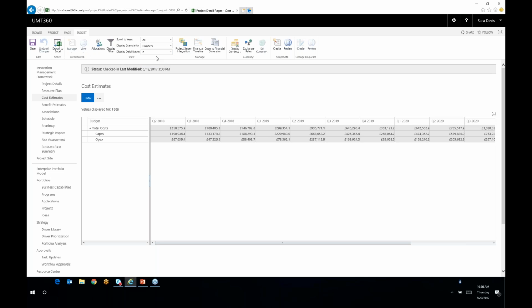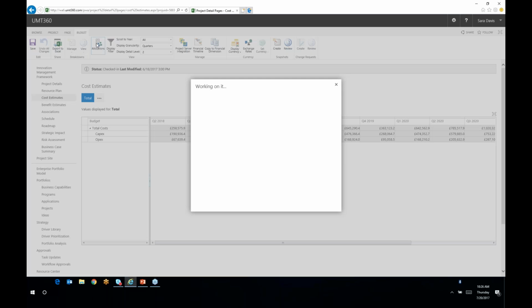I have multiple business units funding the same initiatives. So there are a couple of ways you can deal with this. It can be a simple thing. We have what are called allocation centers or cost centers. On a stage-by-stage basis in the workflow, I can confirm whether I want the cost to be broken out on a percentage allocation. So I see here IT is funding a portion of this, and potentially finance and ops, 30%, 30%.